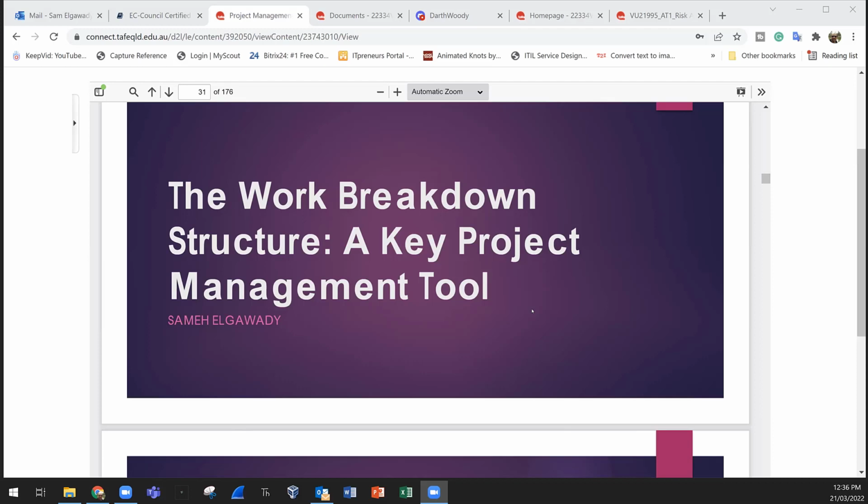Okay. Then I have the plumbing job. So I need a plumber or maybe a team of plumbers so they can finish faster. It depends on risk, money, budget, time, many things. Okay. Someone will do the walls. So I need a bricklayer or multiple bricklayers. I need painters to work after the bricklayers and so forth. So I will take the big project, decompose it into small parts, then assign these different parts to different teams. Okay.